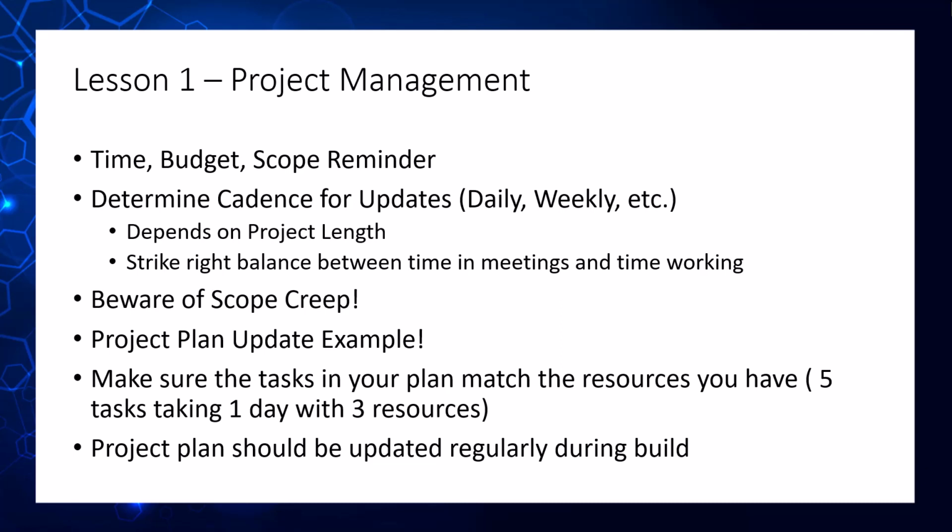So if you're going to have hour-long meetings every single day, then your project plan and your timeline need to account for the fact that you're not getting 8 hours of work in a day, you're getting 7 hours of work in a day. So if you budgeted something to take one day, that's going to take a day and a quarter or a day and a half to do, just because the team can only work on it for 7 hours instead of 8 hours in a day.